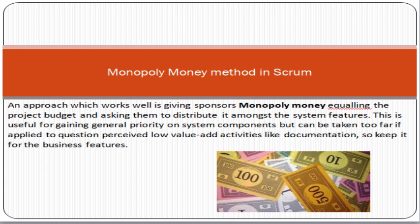For example, if your project budget is five thousand dollars, you take the same amount in fake or monopoly money and give it to your project sponsor. Suppose you have five features available — such as payments, customer sign-up, and product catalog. You give the fake money to the project sponsors and ask them to indicate how much money they want to spend on each of the available features.